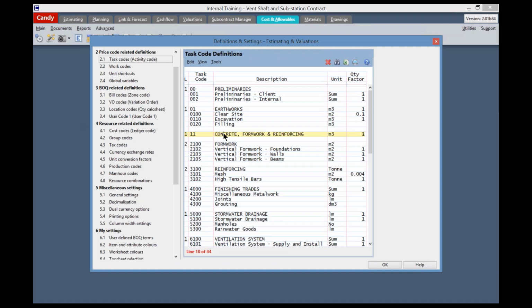The second column is the task code list column. The task code list is not sorted by code like your resource code list. These codes are positioned by the user into a logical vertical order under a heading structure similar to the bill. I will demonstrate this by adding some task codes to the existing list without disrupting the structure already created. But let me finish explaining the columns first. The third column is the description column, and each task code and task heading is defined here.